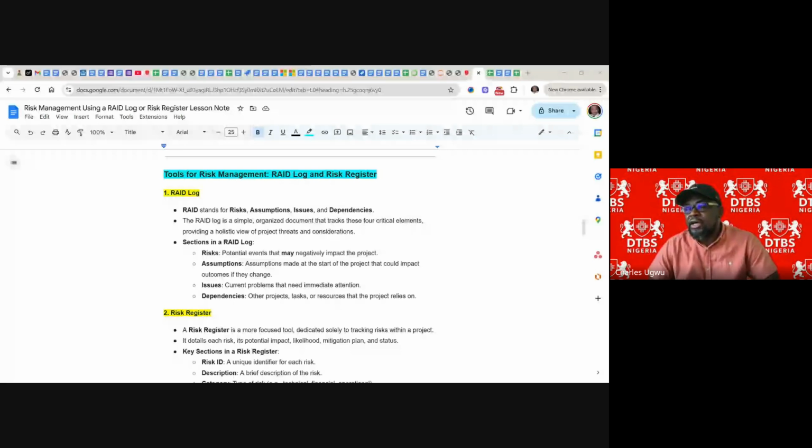And if there is a project waiting for our project to complete before their own project can start, they already have time and money, they have a target. Maybe we said our project is going to finish by the end of June. So they have planned everything on their project so that the moment we finish, that project starts. And we have a delay. We couldn't finish in June. Do you see the way we've affected their projects? Let's look at a CRM system.